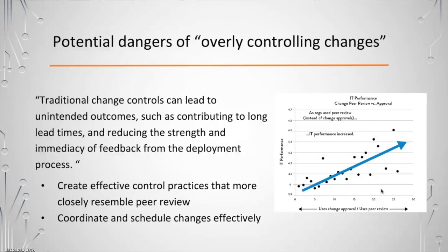Some measures we can take are adding more questions that need to be answered on the change request form, or requiring more authorization, like having another manager do the approval. Also requesting more lead time for change approval, so that change requests can be high quality.